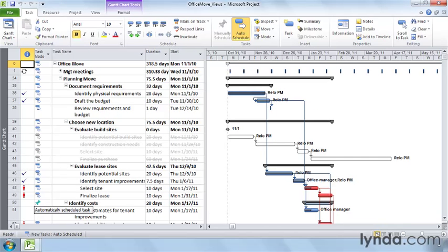The Gantt chart view here shows the tasks in the project, the task links that determine your schedule, the resources assigned, and more. This view is called a single pane view because it contains just one view, the Gantt chart. But the Gantt chart view does have a left and a right pane. The left side is a table of data, and the right side is a timescale that shows when tasks are scheduled against a calendar. You can also show two views at a time.